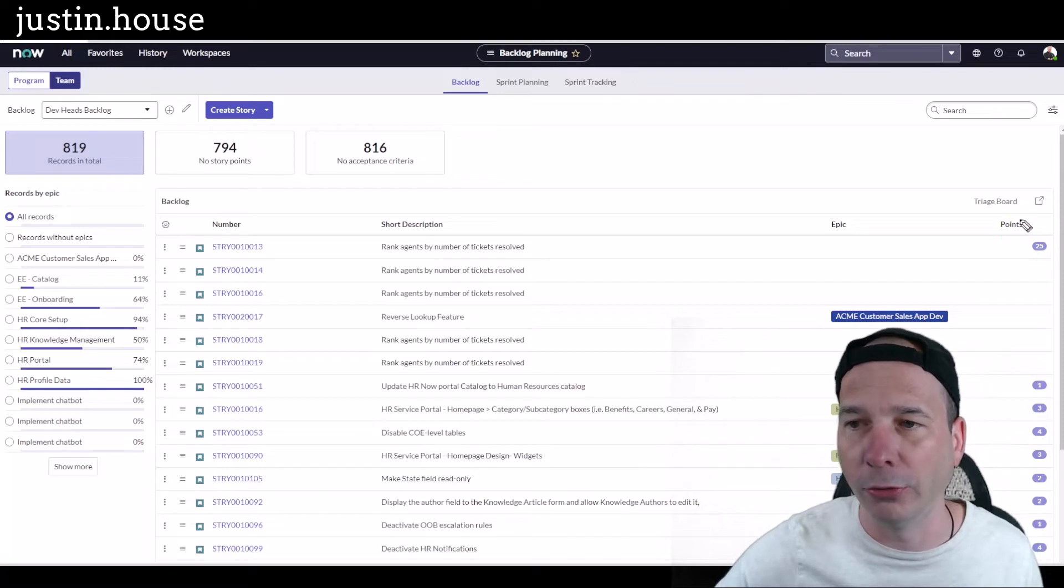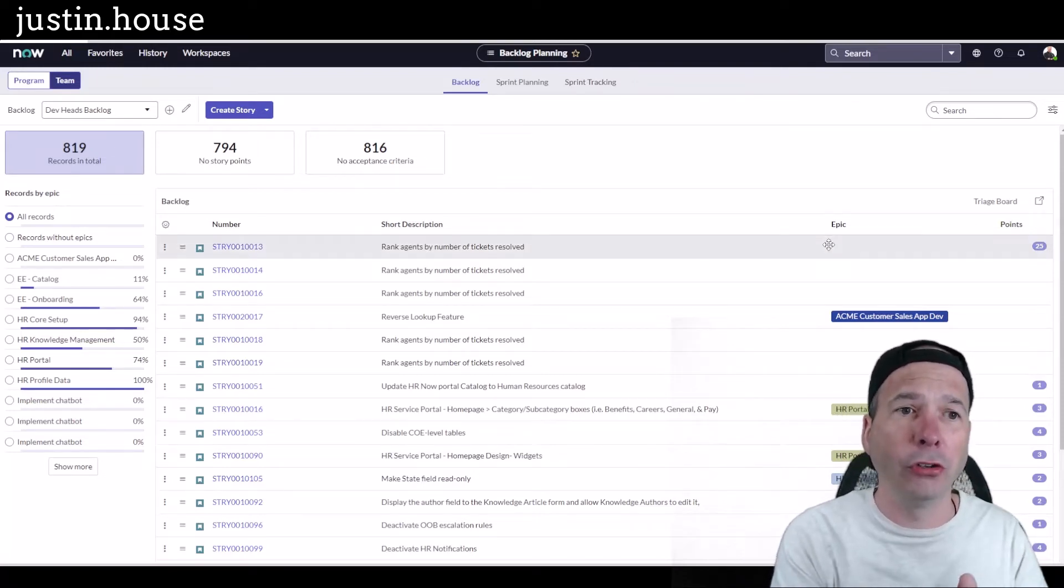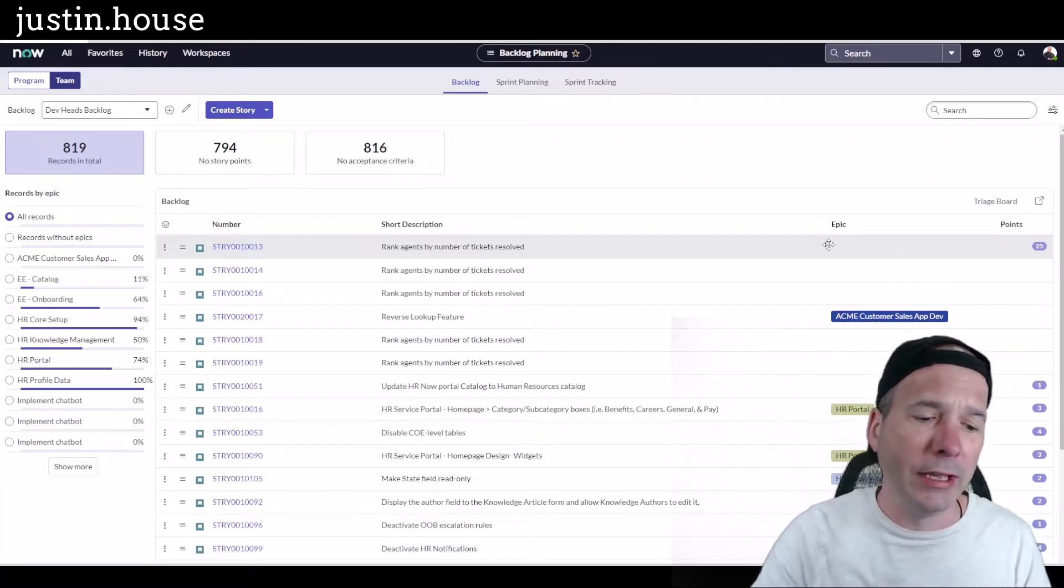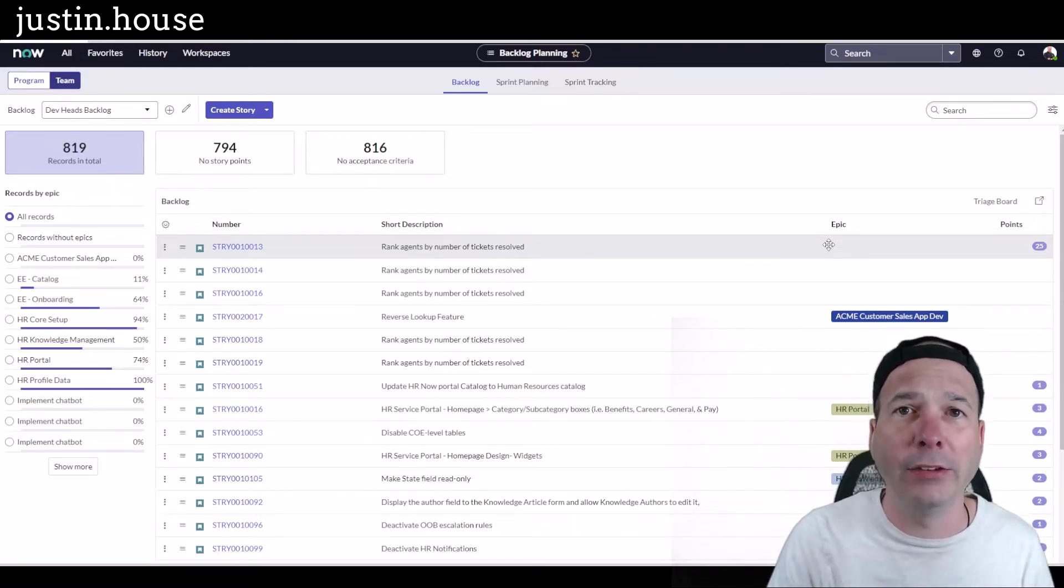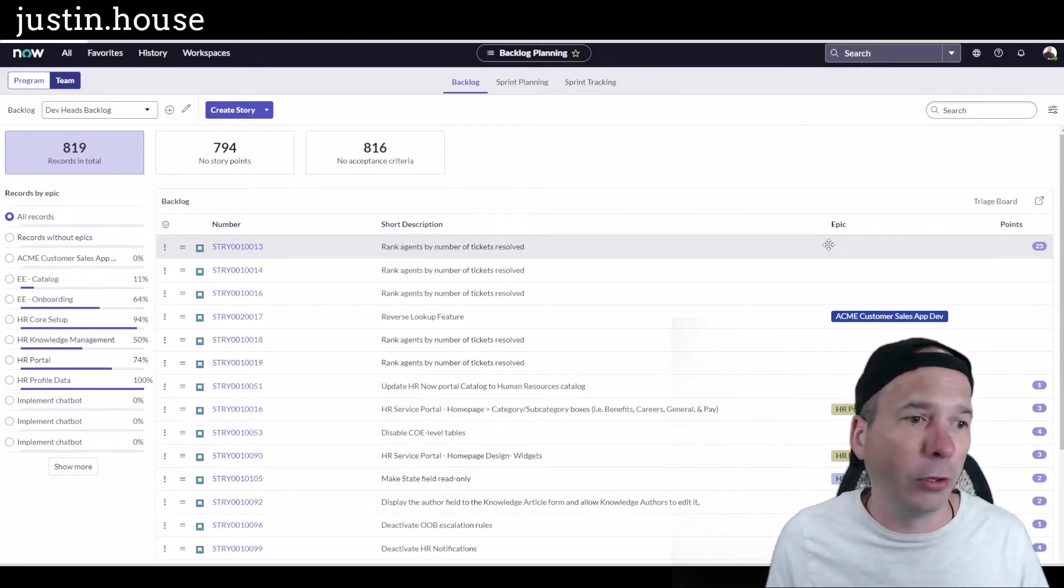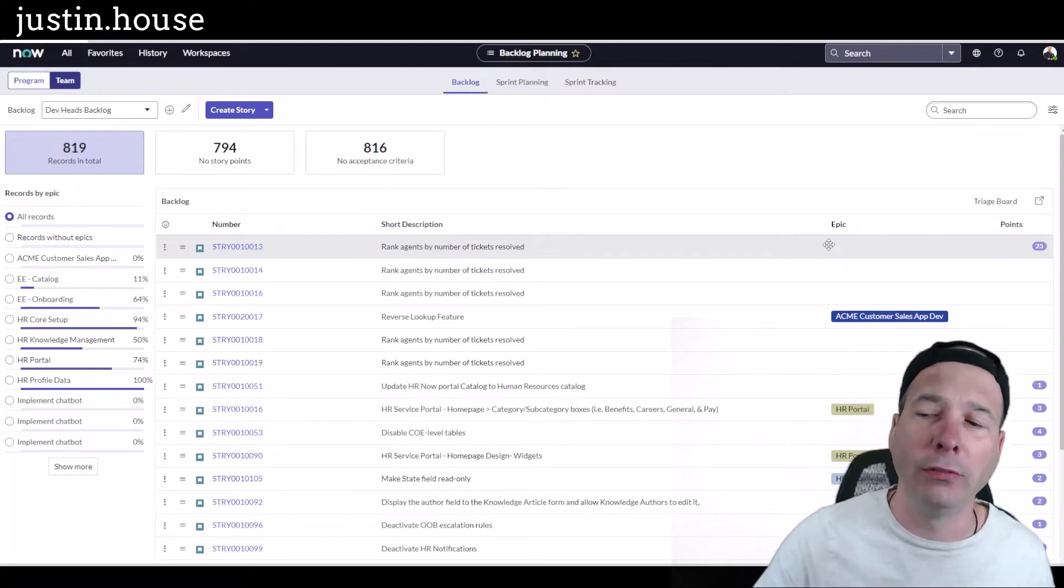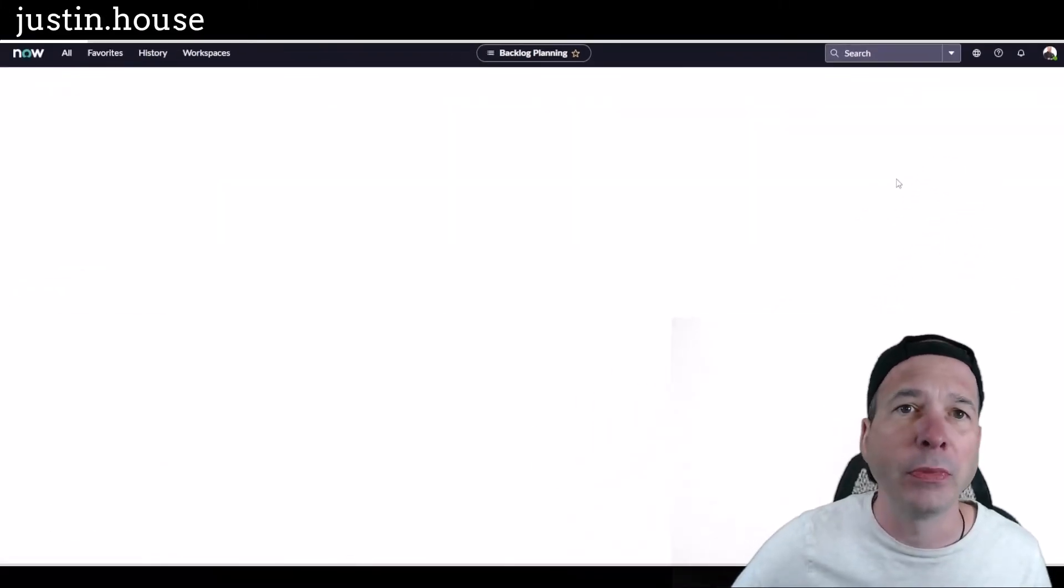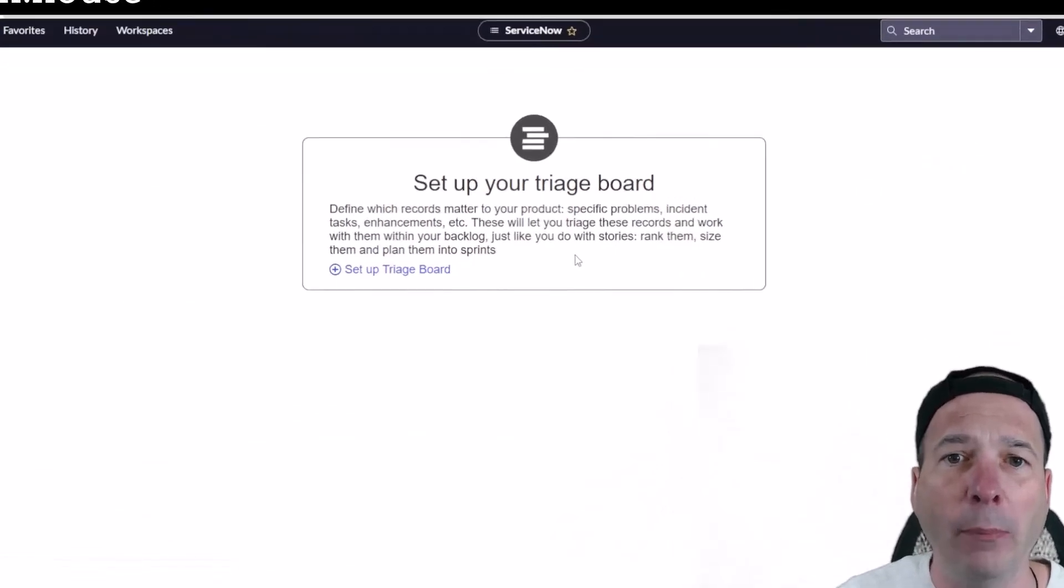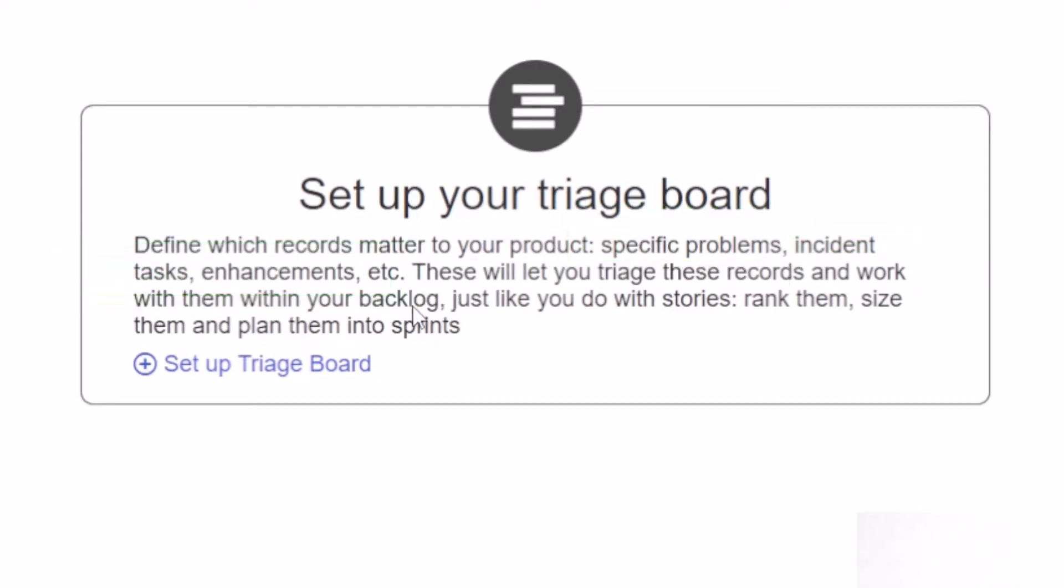Let's talk unified backlog. You just saw a story, but what about incidents or problems or other things in ServiceNow that have to get done? You have a team that's working through sprints and they're like, how am I supposed to pay attention to my agile queue, my sprint, and do all this other stuff? ServiceNow has got an answer. If you look right here, I've got a triage board. If I click on that, I can come in and see different things I might want to associate with my backlog. Look at here: problems, incidents, tasks, enhancements—anything in ServiceNow that is based off the task table.